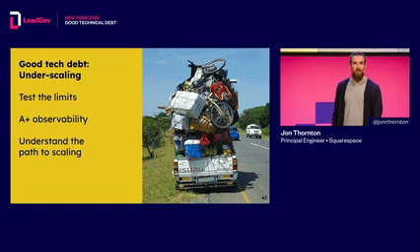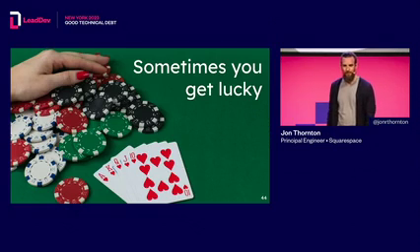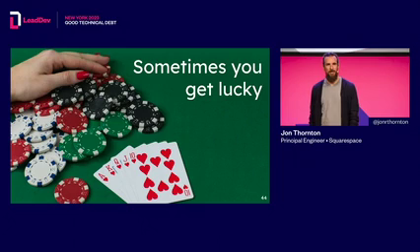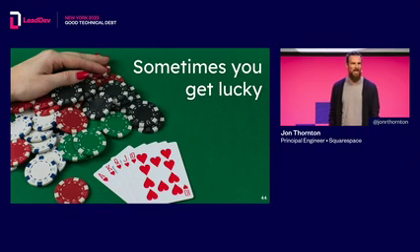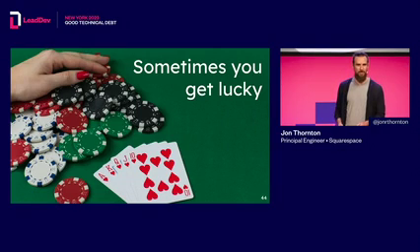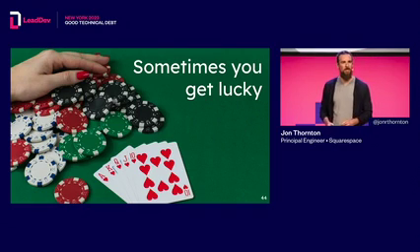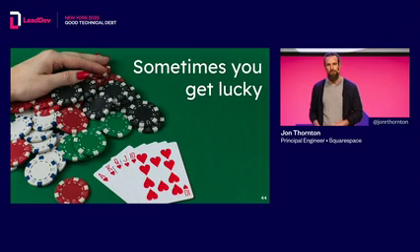And the wild thing is, our bet turned out to be a winner. Not only did our first guess satisfy our users, but the feature scaled way better than any of us expected. In fact, this unscalable code supported hundreds of thousands of users, and it was in production for years before we had to replace it. And the thing is, if we had built the more robust version first, our project would have shipped later, and we never would have known that the simpler version could have worked so well.